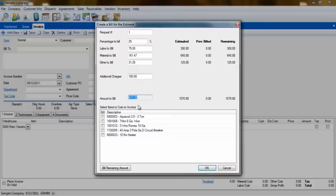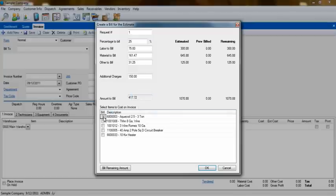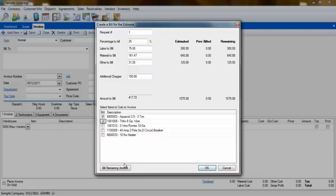Below the total amount being billed, you'll see a list of inventory items from the quote. Here, you will be able to select which items you want to add to the invoice at this stage of billing. When you are ready to bill the final stage of the project, you can simply click the Bill Remaining Amount button, and everything that has yet to be added to an invoice will be selected.